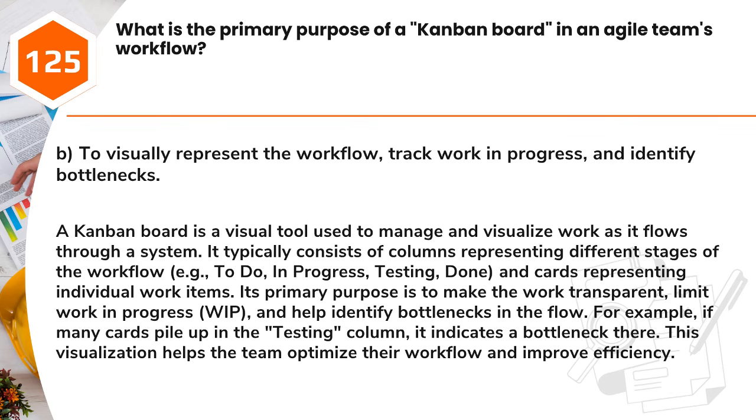Answer: B. To visually represent the workflow, track work in progress, and identify bottlenecks. A Kanban board is a visual tool used to manage and visualize work as it flows through a system. It typically consists of columns representing different stages of the workflow, e.g., to do, in progress, testing, done, and cards representing individual work items. Its primary purpose is to make the work transparent, limit work in progress, WIP, and help identify bottlenecks in the flow. For example, if many cards pile up in the testing column, it indicates a bottleneck there. This visualization helps the team optimize their workflow and improve efficiency.